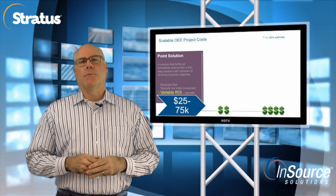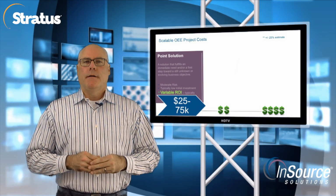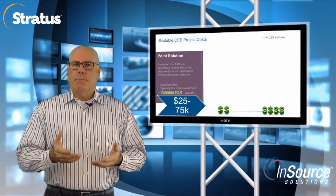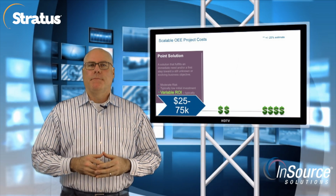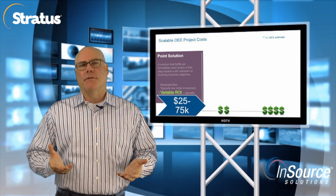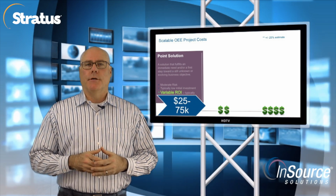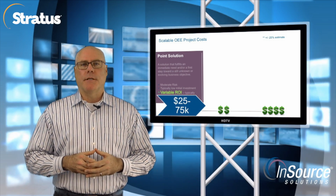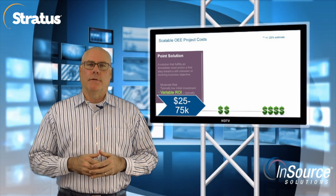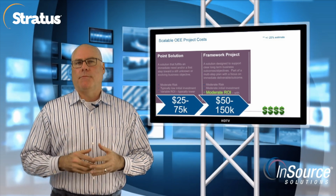It is possible to deploy an OEE project as a pilot, or what we call a point solution. This point on the scale allows us to test it out or provide some initial results on which we can build a case for greater value. You can do that at a very low cost, low enough in fact that it's not a terribly significant loss to simply start over again when you decide to look at rolling it out to a broader scope. Many of our clients find this pays for itself not only in savings, but in what they learn about how to move forward effectively.